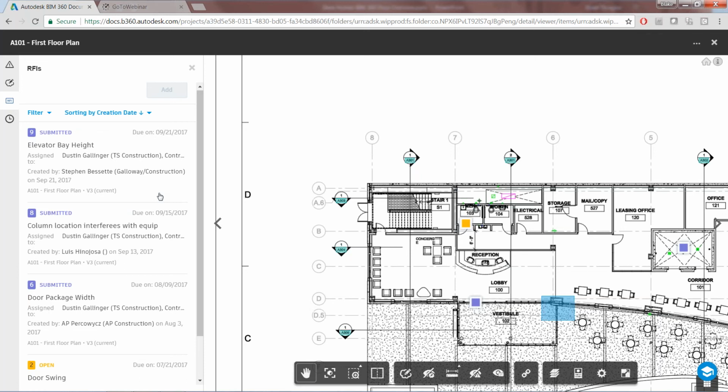So it's going to go from the person that created it onto the next person that's designated, onto the next person, and potentially onto the next person, and then back in the same direction that it came. So it's much more structured, often causing some sort of change to the contractual documents. So if there's any sort of change order or an ASI that needs to be submitted with the RFI, that can all be done.